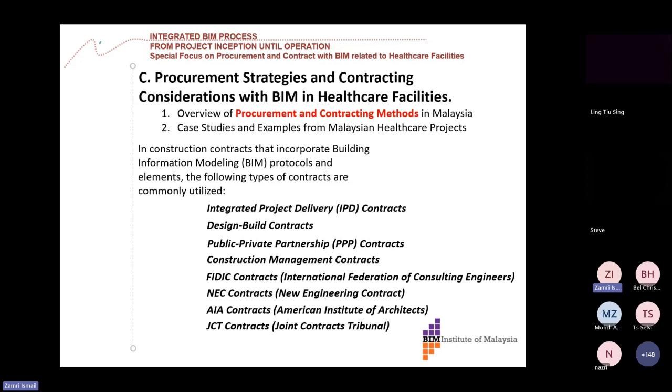by attaching, or rather annexing, BIM requirement to design and bid contract under JKR, it may not work effectively because the time duration given for the design and construction, I would say, is a bit too short. That's why the contractor is rushing to do piling, to do ground beam, even before RDI or RDE has been completed, and before the modeler can even do the final routing model and do a proper clash analysis,